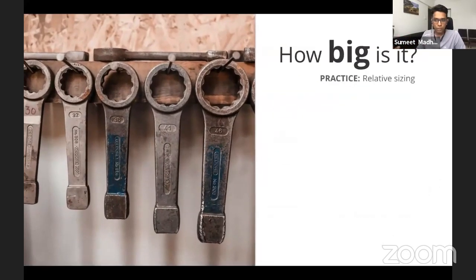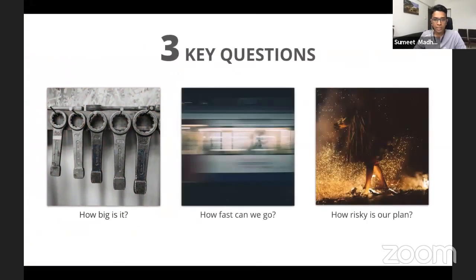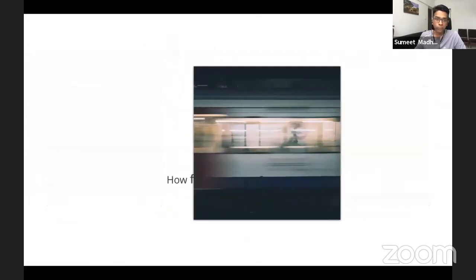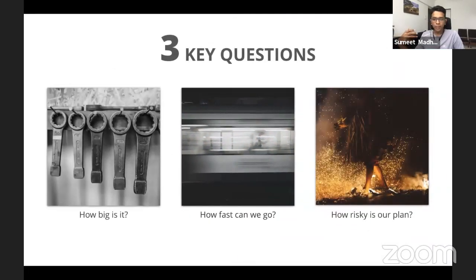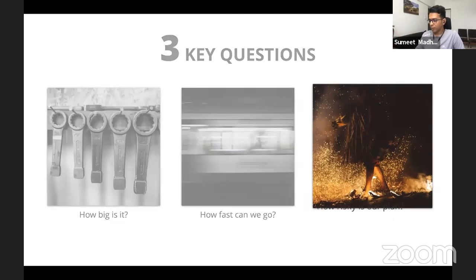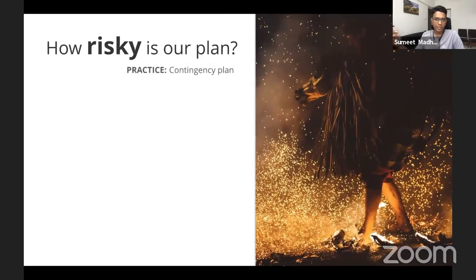We try to answer these with three different kinds of tools or practices. On most agile projects, we try to answer the 'how big is it' question with relative sizing, and we'll mostly do it with story points. The second question is how fast can we go, and the practice we'll introduce for that is the velocity game. And then last but not least, there is the question of how risky is our plan, which we'll answer with the practice of contingency planning.